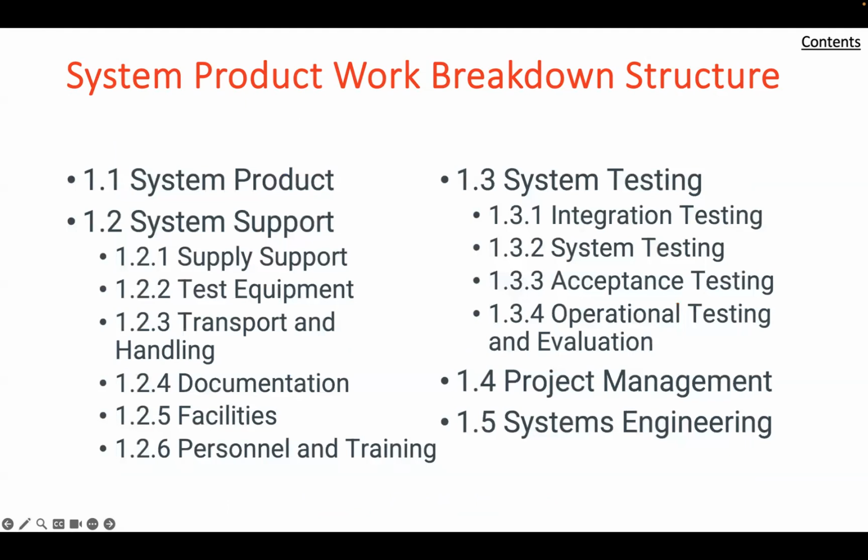So then getting into the details of the WBS, the system product is the total effort required to develop, produce, and integrate the system itself together with any auxiliary equipment required for its operation. So we can be thinking about that here. The level 3 entries are seen to be several subsystems as well as the equipment required for their integration, that is assembly equipment and other auxiliary equipment used by more than one subsystem.